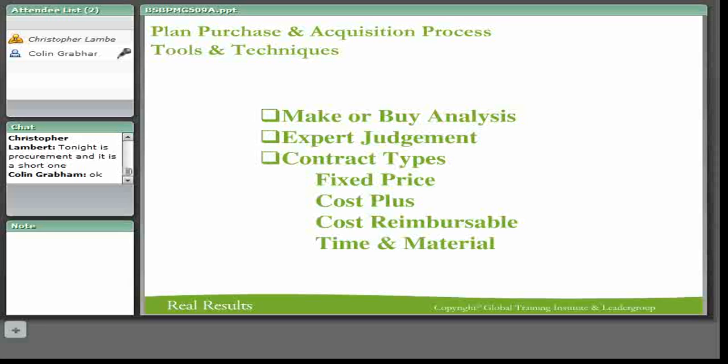Where I've used this one before, I put out a tender, and the terms of reference said how we evaluated was this criteria. We put out a small part of a pilot, to develop a very small piece. And what we asked them to quote on was a rate per hour. The reason why we did that is because we had no idea how big the project was, and we needed the supplier to actually help us work out how big this project was.